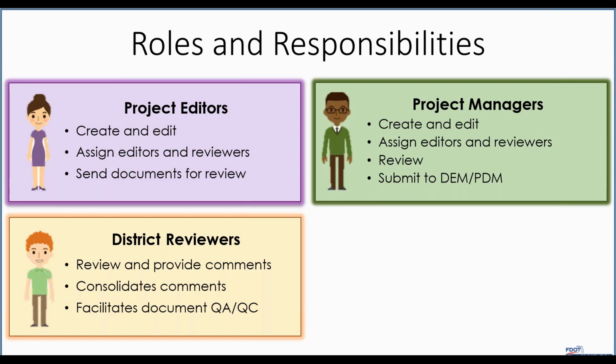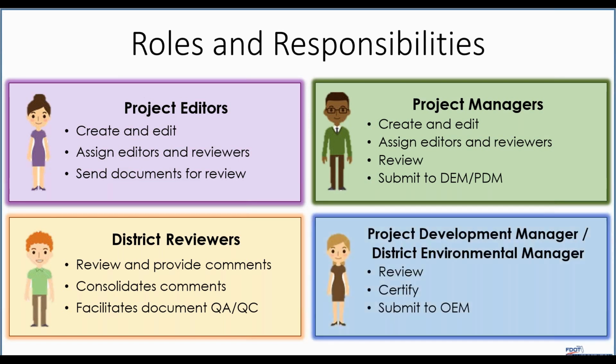Next up, we have our project managers. Project managers can be consultants and/or FDOT staff. They essentially have the same controls and responsibilities as the project editors, but their key role in the OEM review and approval process is to submit the draft document to the district environmental manager and project development manager for their approval. Which brings us to the district environmental manager and the project development manager. They can review and certify documents, and they also submit those documents to OEM for review and approval in SWEPT.